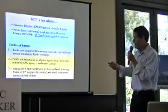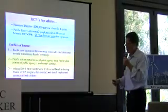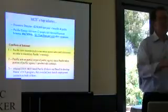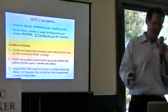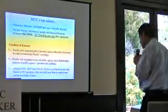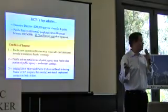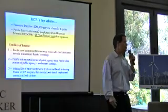The payment plan, what they did was they said, we no longer work on hours, and we no longer have deliverables. And hey, of course they have deliverables. Let's not discount that. And they have to spend hours making those deliverables. But the way they set up their pay plan is they say, we're going to get paid 40 cents a megawatt hour. Now that's getting paid just like the electric meter that hangs on the side of your house.